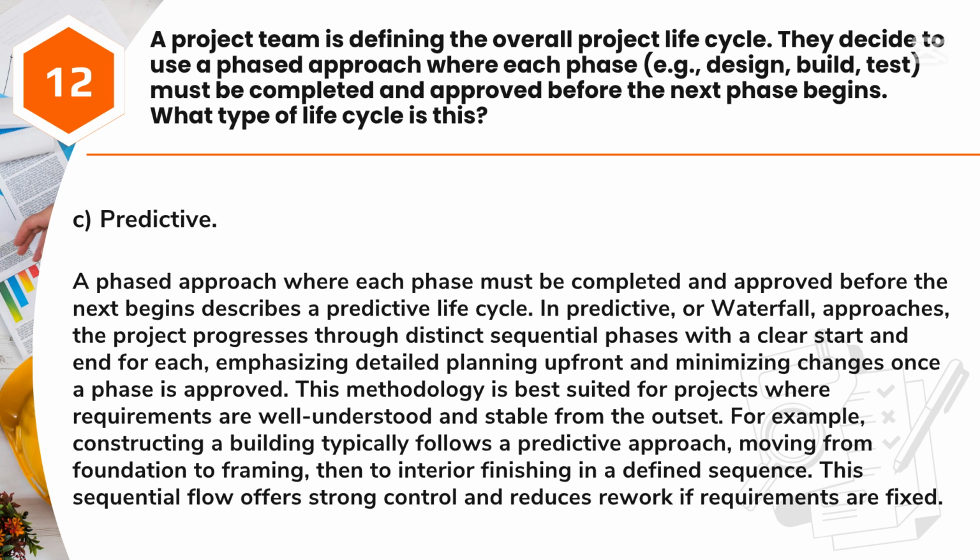For example, constructing a building typically follows a predictive approach, moving from foundation to framing, then to interior finishing in a defined sequence. This sequential flow offers strong control and reduces rework if requirements are fixed.